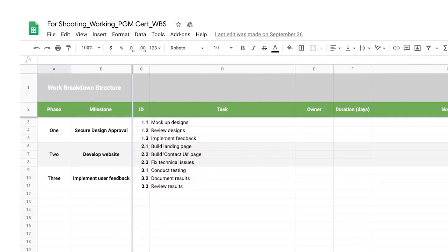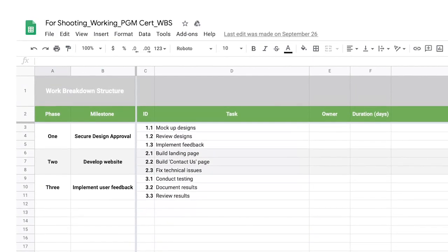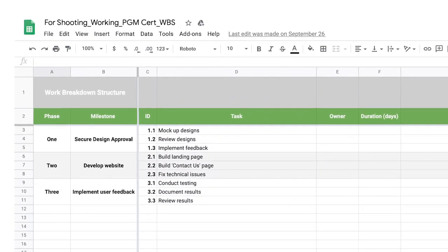for an entire project. It's also important to note that while creating a work breakdown structure is a helpful exercise for visualizing the tasks of a project, you wouldn't typically include this type of diagram in your official project plan. Instead, you'd input the tasks identified through this exercise into a spreadsheet or your chosen work management software, where you can more easily assign owners to each task.